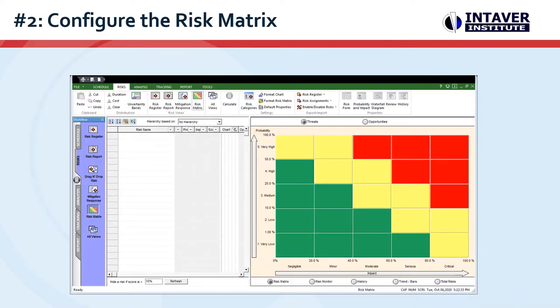Number two: configure the risk matrix. The risk matrix is central to how risks are assessed, managed, and reported. It is important that it is configured correctly based on the type of analysis you are doing. This can include the number of impact and probability columns and rows, ranges, colors, input formats, and risk scoring. Open the risk format dialog box to begin.